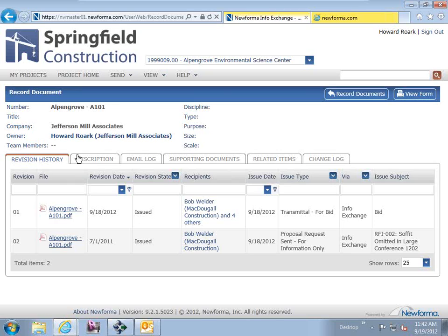And the construction team might want to have access to both for different purposes. They might want to be able to see the documents that were in a given work package, but also they may want to see the conformed set, because that one may have an earlier version of a given drawing or specification section, but the conformed set would have the most recent version in the cumulative set.